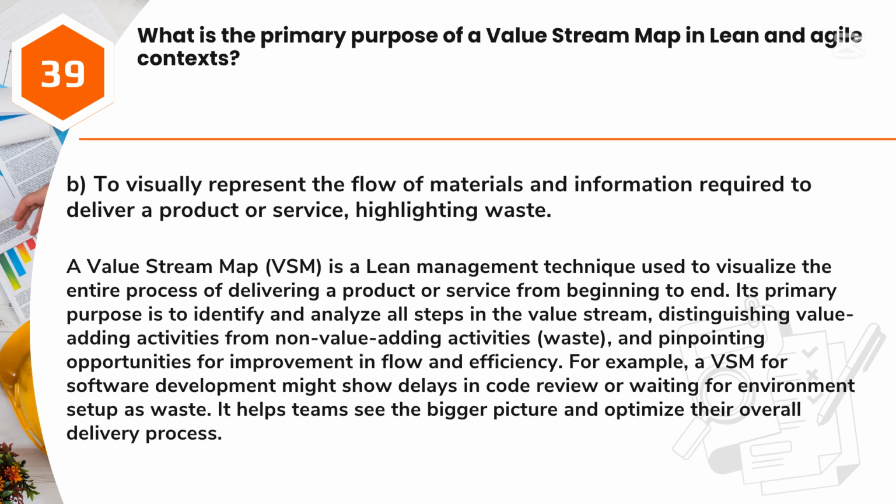Its primary purpose is to identify and analyze all steps in the value stream, distinguishing value-adding activities from non-value-adding activities, waste, and pinpointing opportunities for improvement in flow and efficiency. For example, a VSM for software development might show delays in code review or waiting for environment setup as waste. It helps teams see the bigger picture and optimize their overall delivery process.